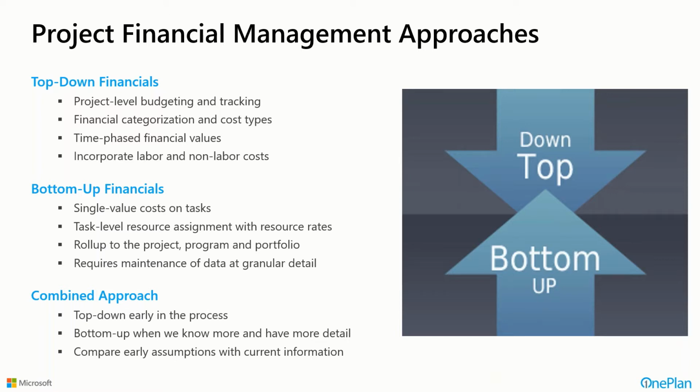There's also an approach of bottom-up financials, where you might actually do this on an individual task level within your project schedules, where you have costs associated with those tasks, maybe resources assigned to those tasks, and those resources have rates to those. And then they roll up through those tasks, through the project, up to the programs and up through the portfolios from a bottom-up perspective. But this does require maintenance of data at a much more granular level of detail.